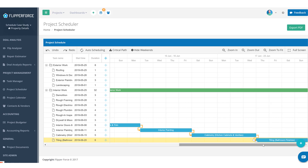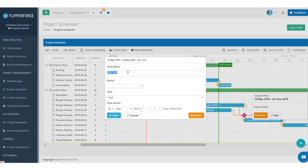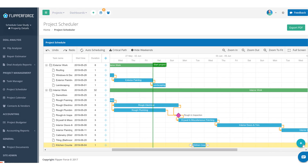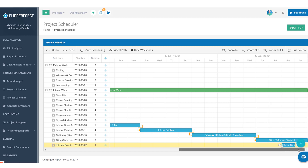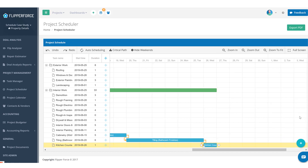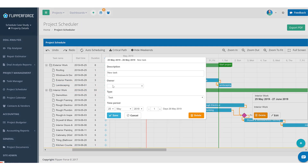After tiling is done, let's assume we're going to get the countertops installed. Once the kitchen cabinetry is in, the countertop company will come out and measure the countertop area to cut it down to size and manufacture it. Let's assume that once we get the tiling done, we give them about a week or two to get the countertops manufactured — kitchen counters can usually be installed in just a day. Once countertops are installed, we can also get the appliances delivered.